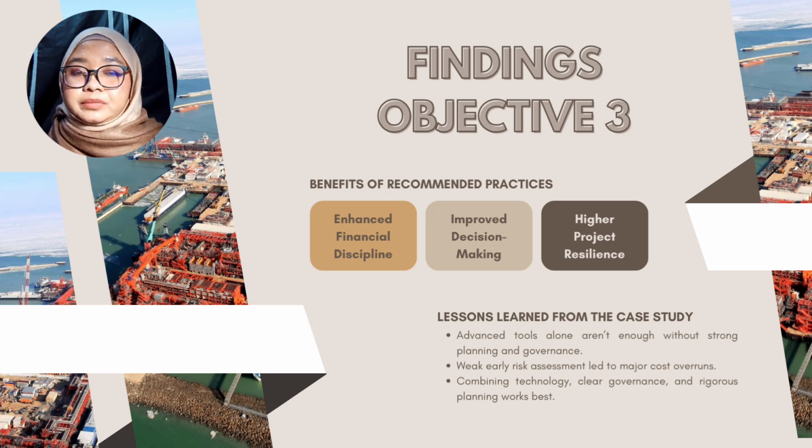But one of the most important lessons from the case study is that technology alone is not enough. Despite using BIM, analytics, and modular design, Kashagan still faced cost overruns due to poor early planning and weak risk assessment. This tells us that digital tools must be supported by strong governance, early feasibility studies, and stakeholder coordination. So, in summary, these practices work best when applied together, with both technology and planning in place. This integrated approach is essential for improving project delivery in the Malaysian oil and gas sector.